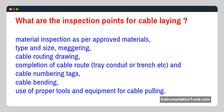What are the inspection points for cable laying? Material inspection as per approved materials — type and size — meggering, cable routing drawing, completion of cable route, tray, conduit, or trench, cable numbering tags, cable bending, and use of proper tools and equipment for cable pulling.